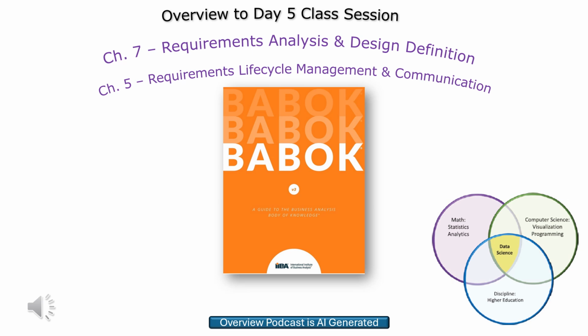To guide you through this process, the chapter provides some key elements. Identify assumptions, define measurable evaluation criteria, and evaluate alignment with solution scope. Let's look at identify assumptions for a second. Those are like hidden landmines that could blow your project off course. For example, you might be assuming a certain technology will be available. Or that a key stakeholder group will be readily available to provide input. By identifying those assumptions up front, you can assess the risk they pose and develop backup plans. It's kind of like when they're building a house. They always tell you to check the foundation. Exactly. Check the foundation before you build those upper floors.